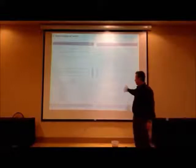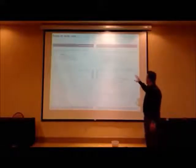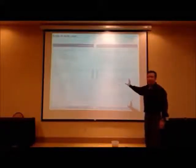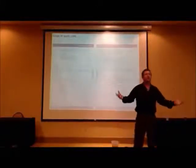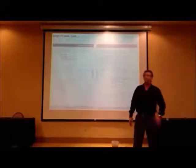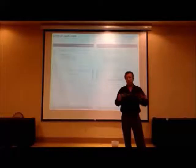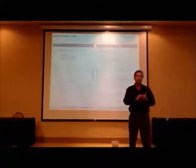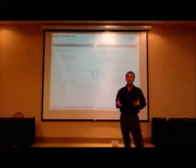Landscaping, the roof, windows, glass doors, demo, general interior, everything about the kitchen. When I go through with my contractor, I go, let's say it's the master bedroom. 2 cracks in the ceiling. First of all, in the general interior, I'm gonna fix all cracks, spackle, tape, paint, same. But every bedroom, 2 cracks in the ceiling, small hole in wall under window. I mean, every room is that detailed.